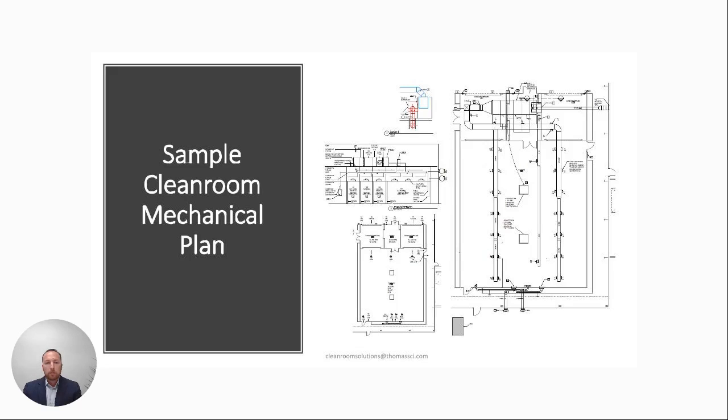So this is an example of a mechanical design, and essentially what we'll do is our team will draw this up, and then we'll utilize a local HVAC contractor that we will sub, hire, and manage to install at your facility, depending on where you're located in the country. And the thought behind this process is we control the design, the local contractor installs. In an instance where there's an issue, say you have a freon leak in your HVAC unit, then the installing contractor is right down the road and they're able to act quickly to rectify that situation.